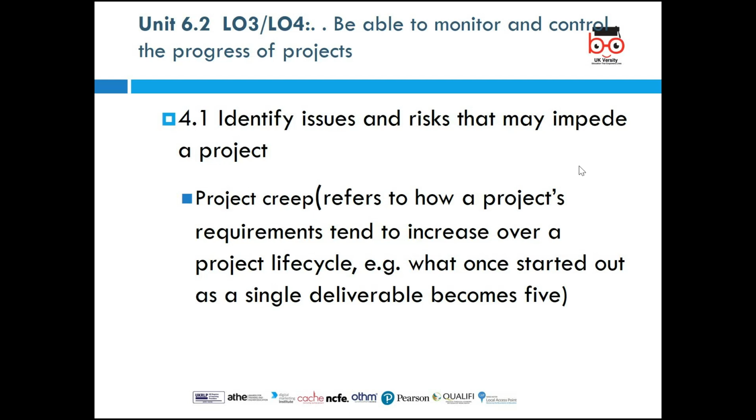However, within the course of the project, we might find it necessary to increase it from 2 stories to 4 stories. This is going to cause the requirement of the project to increase, because initially the foundation of the project was meant for 2 stories. So if we want to make it 4 stories, then we need to solidify the base or the foundation of the project, and this is going to cause the project to delay because the requirement has increased from what we initially intended.